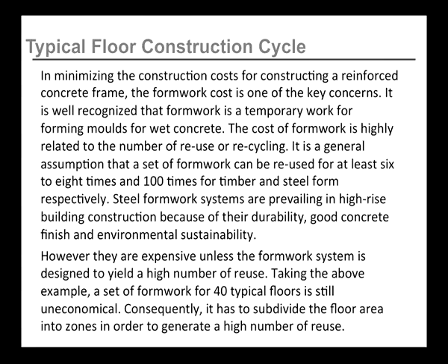It's the role of a planning engineer to balance the resources, inputs, and duration of activities in order to ensure a smooth flow of work sequences and in meeting the project duration and delivering the project on time as per quality standards. In minimizing the costs of constructing a reinforced concrete frame, the formwork cost is one of the key concerns. It is well recognized that formwork is a temporary work for forming molds for wet concrete. The cost of formwork is highly related to the number of reuses.